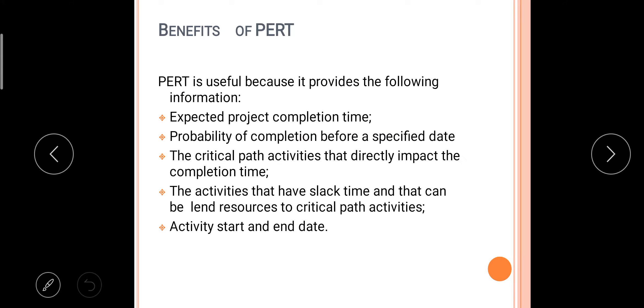Next we have benefits of PERT, or you can say advantages of PERT. PERT is useful because it provides the following information: first, expected project completion time; probability of completion before a specified date; the critical path activities that directly impact the completion time.